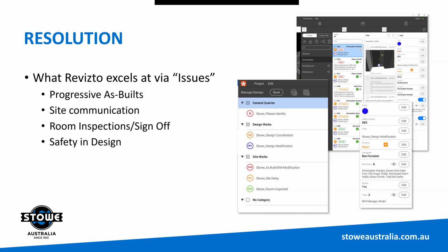We have other stamps to assist in early reviews for safety and design, which can just highlight those issues by our respective assigned people who will specifically look for these things. But we can then group all those potential issues all together. Use of the stamp feature within Revizto makes this process much, much easier. And then, of course, standardizes it between projects.